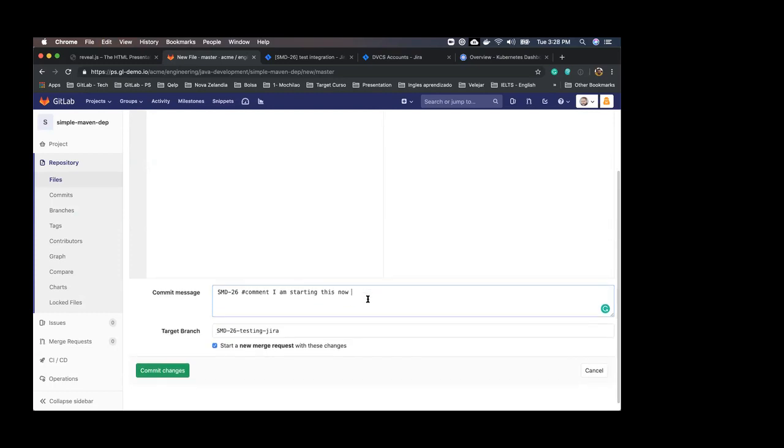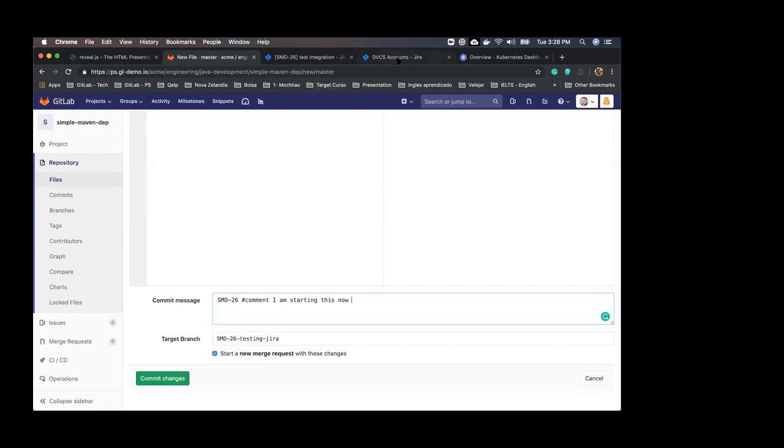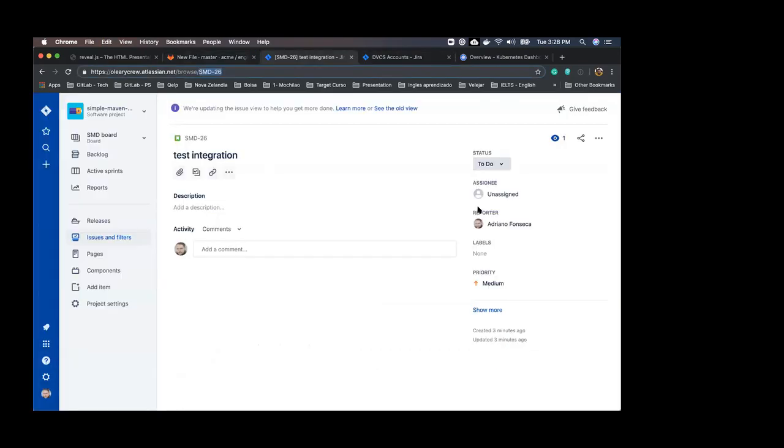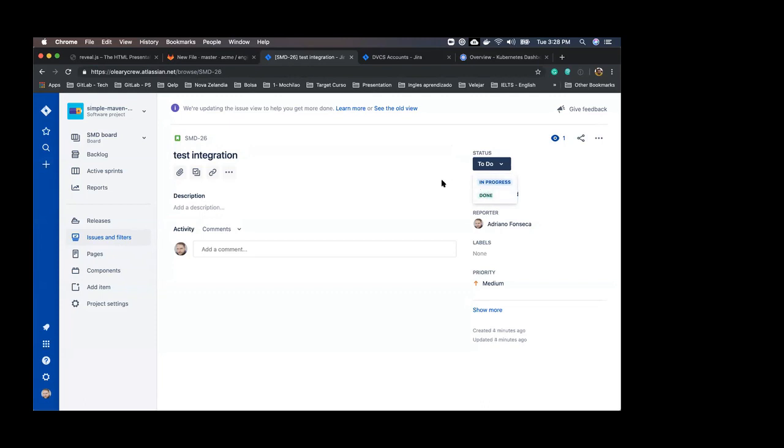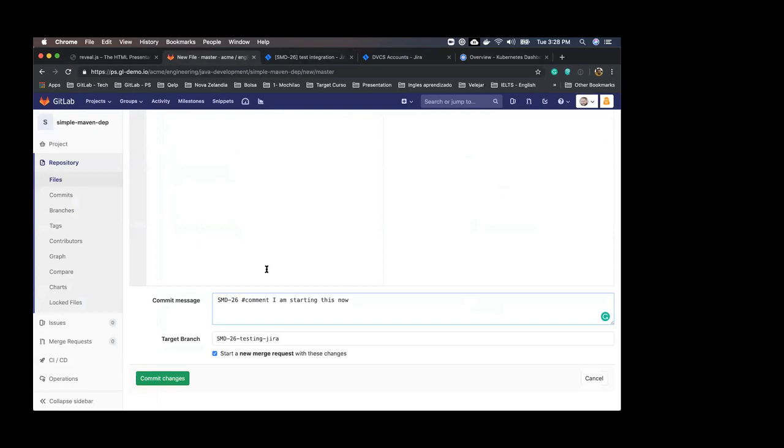If we go here in Jira you can see that I have just these three transitions possible. When you are doing transitions using smart commits you are not using like instructions, you are actually passing the name of the stage. So if you pass something that is not available here it won't work. They use the name because Jira allows you to create your own workflow, so it's important to verify what transitions are available. If you are working in a project that calls the last state closed and not done, and you are using hashtag close, it won't work. So it's always important to come here and verify what transitions are available for you. In this case I will start to work on this right now and I will use in progress to move this to in progress.